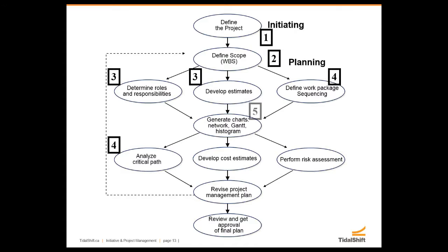Now, with that in mind, and this is where people often push back on this whole concept of rolling wave. They say, well, but I have to give them a detail of the whole thing. Well, you don't have those details. And the more I try to do a long-term detailed plan, the more you're going to have change along the way. So if you want to reduce the amount of change through your project, do it in shorter chunks, do it in shorter pieces. Keeping in mind, of course, that as you get the answers to those smaller pieces, they're going to feed input to the next phase or the next wave.